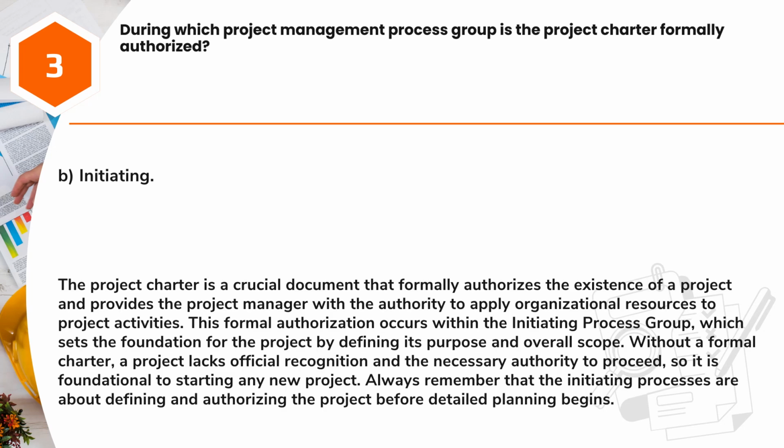Answer: B. Initiating. The project charter is a crucial document that formally authorizes the existence of a project and provides the project manager with the authority to apply organizational resources to project activities. This formal authorization occurs within the initiating process group, which sets the foundation for the project by defining its purpose and overall scope.